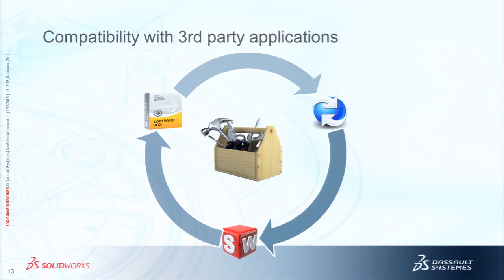I'll take the example of SmartTeam. That is also a PDM system that works with SolidWorks. SmartTeam is not compatible with the new version at SP0. You may need to wait for SP1 or SP2. So in that situation, that should be part of your agenda. And as soon as the compatibility is fine, we should start testing the integration.